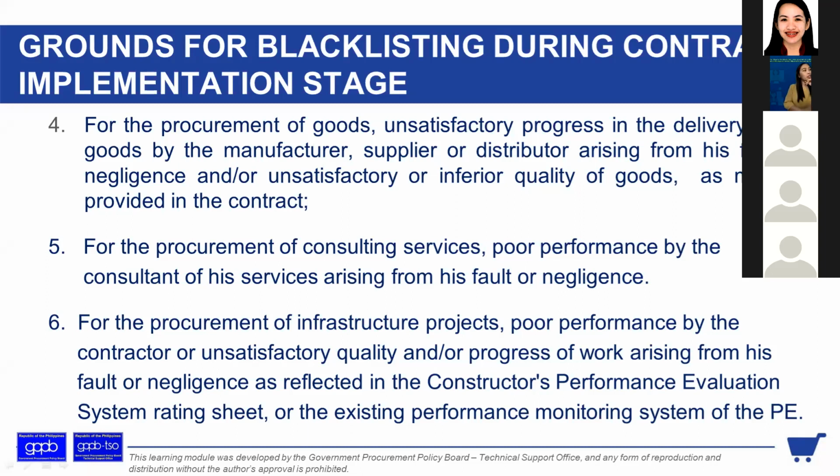Ako nga sinasabi ko talaga, if you cannot, the contractors, if na-anticipate nyo na magkakaroon kayo ng delay, mag-submit na kayo ng request for extension before pa mag-expire yung contract. So defective design, how about for the consultant? For the procurement of consulting services, poor performance by the consultant of his services arising from his fault or negligence is also a ground for blacklisting.